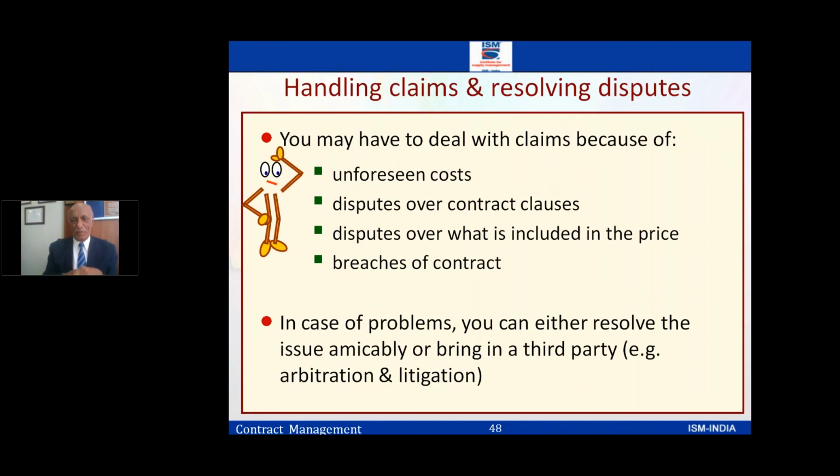Handling claims and disputes. In contract management, this is part of it. There are unforeseen costs and disputes over the contract clauses. Normally the clause which is very painful is the liability clause. Liquidated damages clause. They say, oh, this is a liquidated damage, but I never accepted this. The 2% you're charging per week, I don't have margin, my currency has changed, you have disputes on that. Liabilities clause around, you say, because of you, my company image has gone down, my business is lost, and then you come up with a big figure of claims, and that's where the dispute comes.